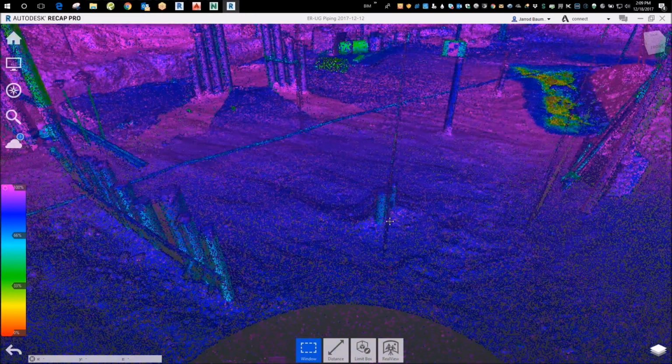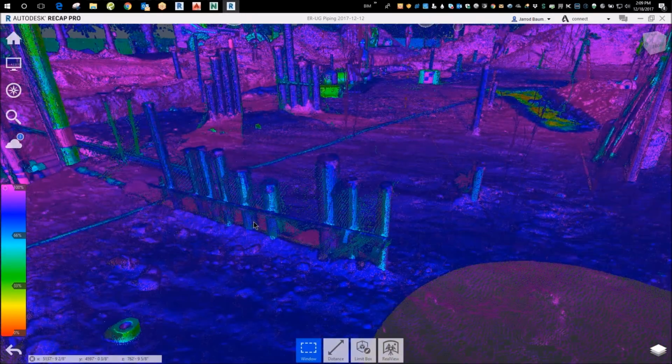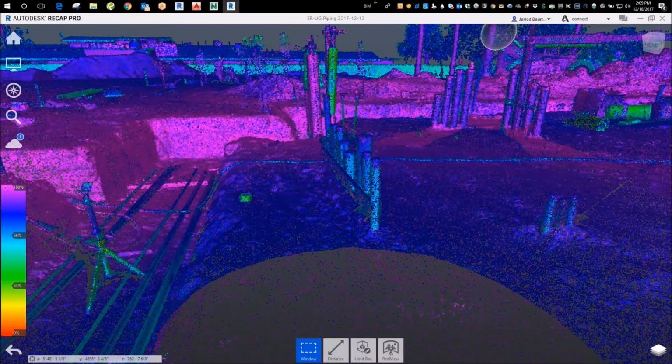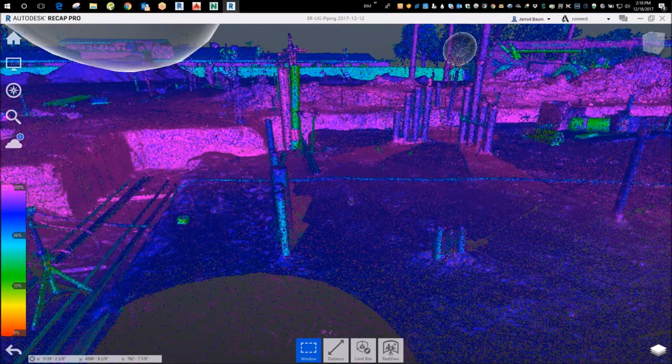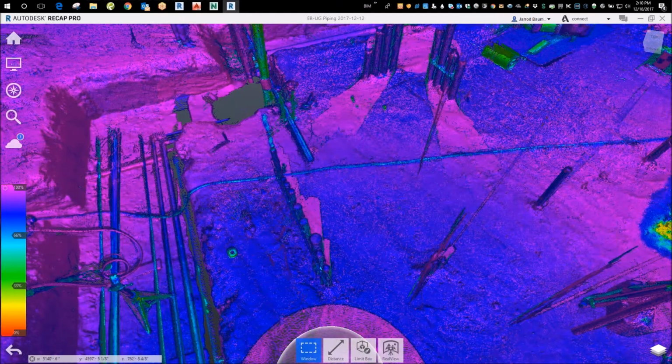But you can see all these conduits, right? So we gave them the four stud corners of this room for them to hit. If they'd used those, but unfortunately somebody had already come along, the plumber had dug a trench and taken out two of them. They had four nails in the corners. Well, then they just started using the grid lines. So a lot of this conduit that they went in first, because it's deepest, is missing.